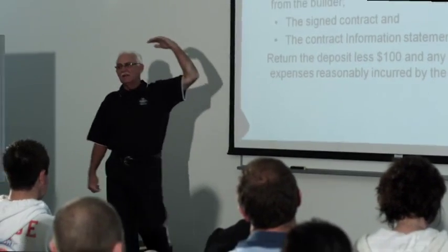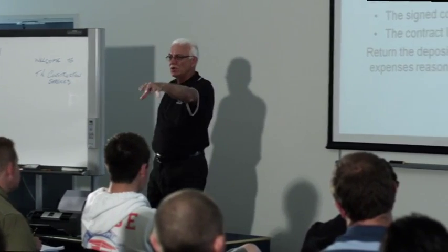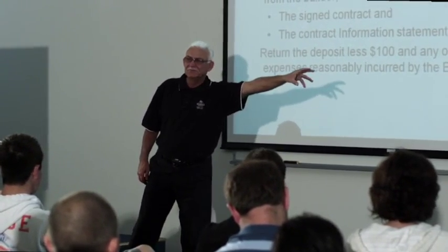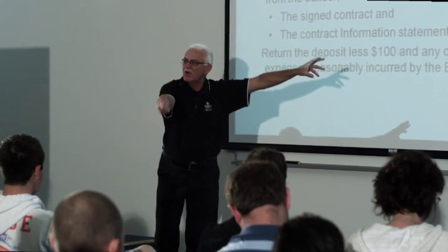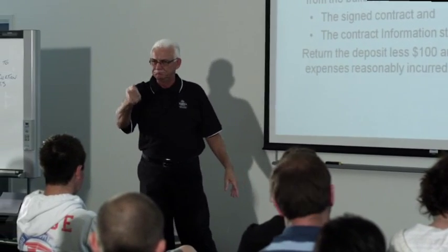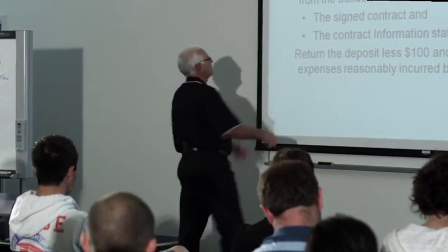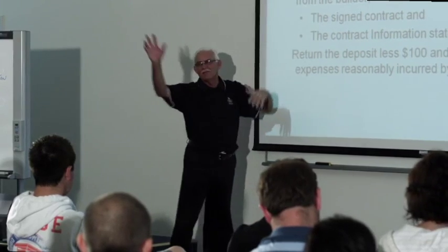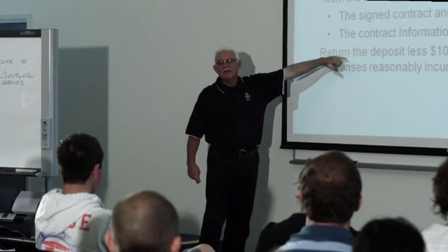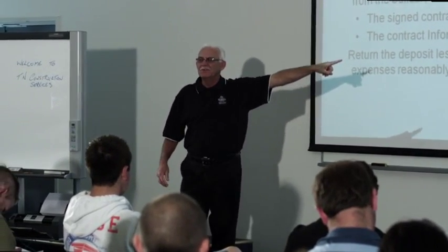If they do pull out of the contract, you're entitled to get paid for the work you've done. Go back to John's preliminary agreement. You've got an agreement. If they pull out, because you've got that agreement in place, you're entitled to get paid. If you haven't done any of that, but you've provided them with a contract and you don't have a preliminary agreement or anything like that, you still have the opportunity of giving them back their deposit, but you're only going to get $100 for your trouble,